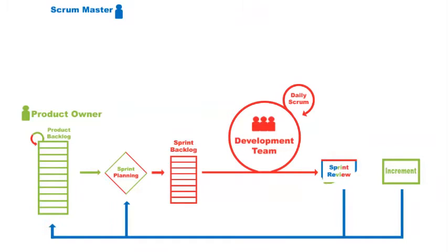The Sprint Review. The Sprint Review is the event of a sprint where the Scrum team and its stakeholders can participate in the inspection of the work that has been produced to meet the goal of the sprint and how this progresses development of the overall solution. The outcome from the sprint review provides a feedback loop to both the product backlog and the choices made during sprint planning. One thing you can be assured to have as an outcome is an updated product backlog, even if it is agreed that the current order is correct.